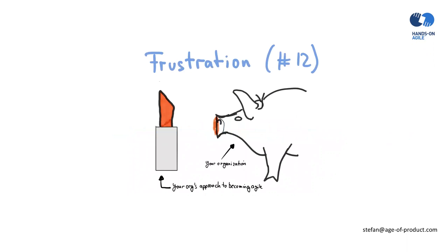There's one tricky situation, though. What if the line manager also serves on the Scrum team? For example, in my last project, we had the case that one of the developers was promoted to a managerial position and he became the line manager of two other developers of the same team. That was a really tricky situation and I recommend avoiding it at all costs because it undoubtedly has a negative impact on the quality of the retrospectives. Think of the Scrum values like courage and openness. They certainly will be affected.